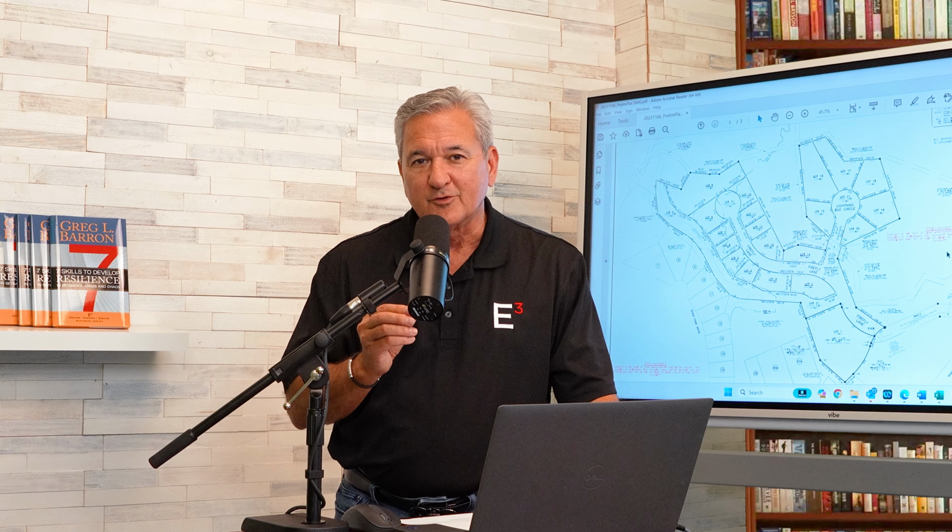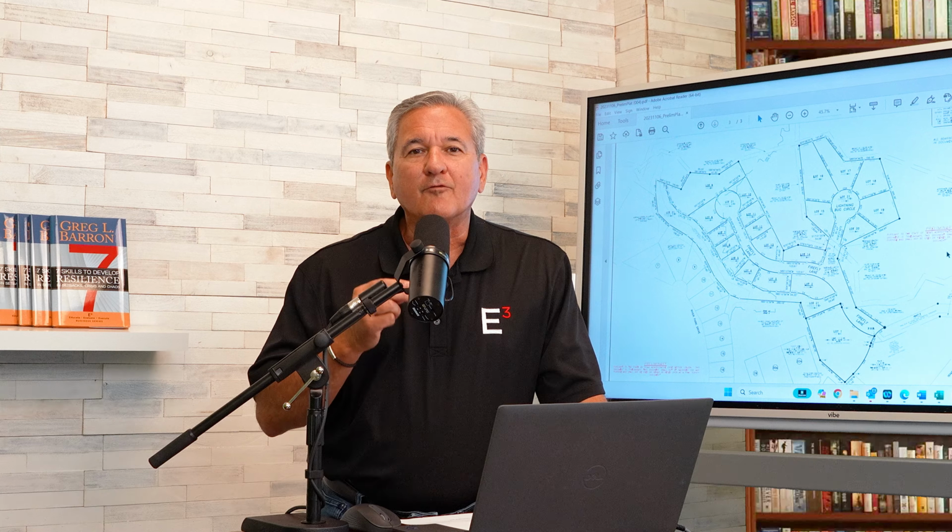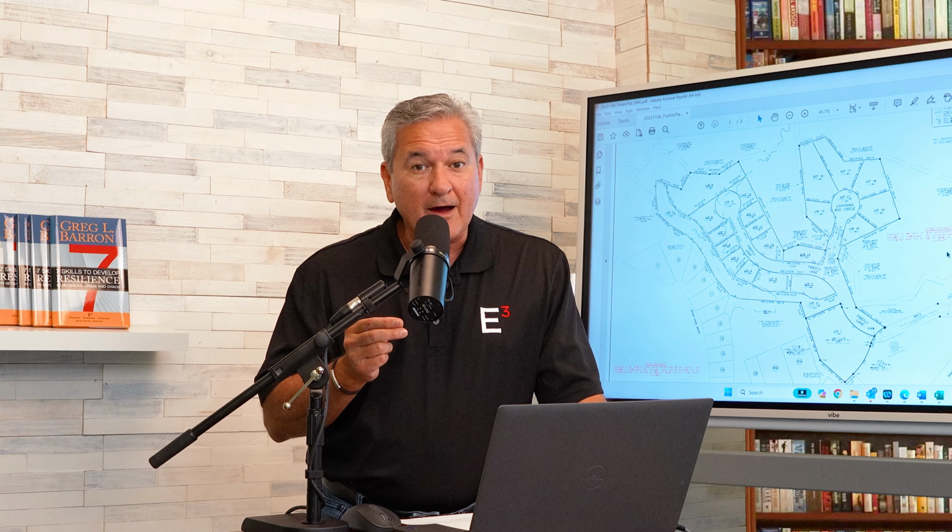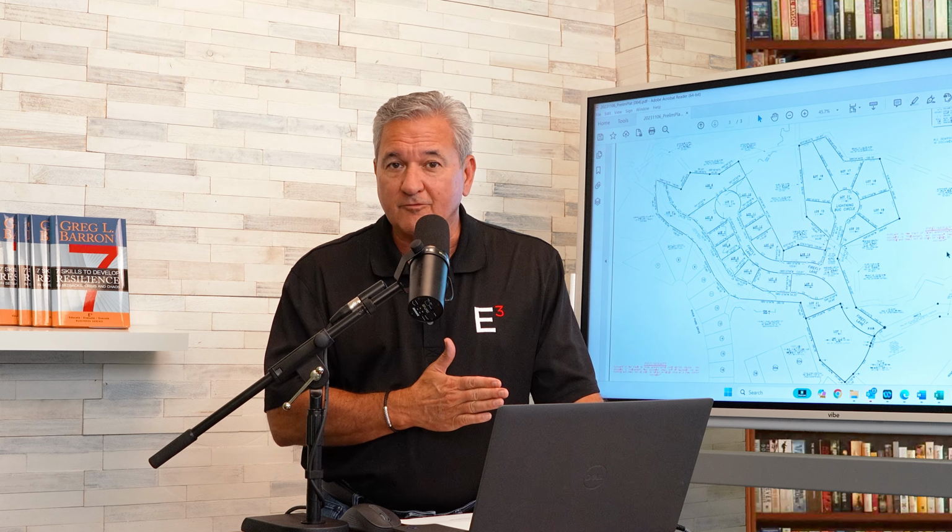Now, the next component of the capital stack is to determine just what kind of investor-sponsor relationship you want to have. How much equity you're going to raise, and how much is going to be sponsored by you, and how much is going to be contributed as equity by your investors. You'll be able to determine your promote rate, your required internal rate of return, and of course you'll need to include the property taxes for the carrying costs throughout the life of the project until you're fully sold out.